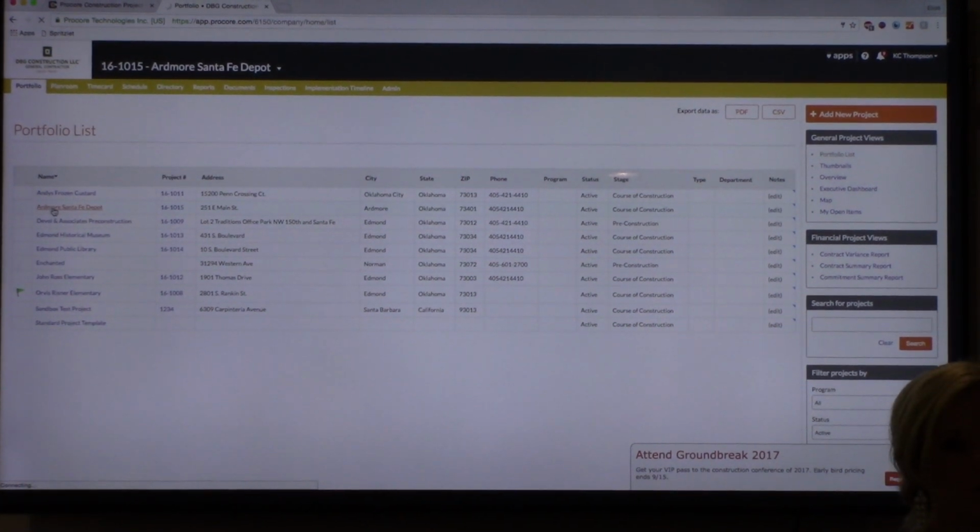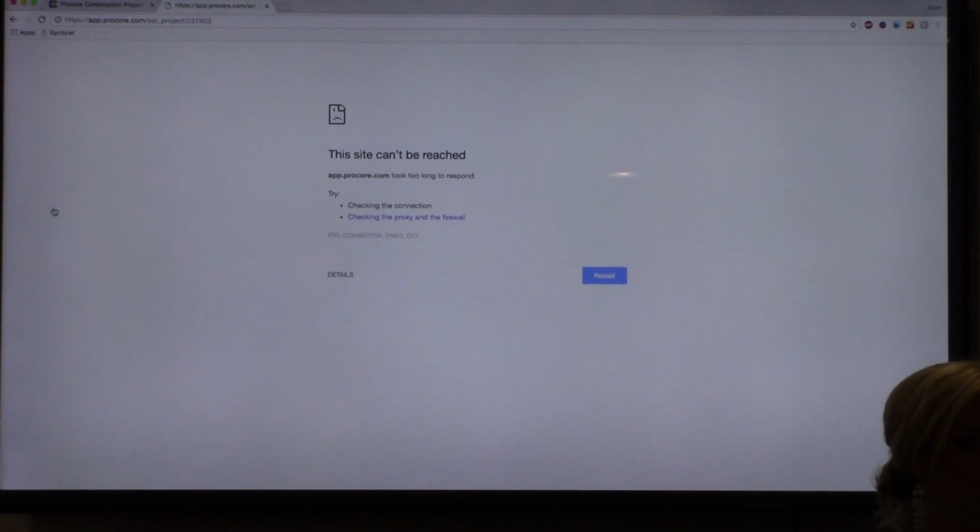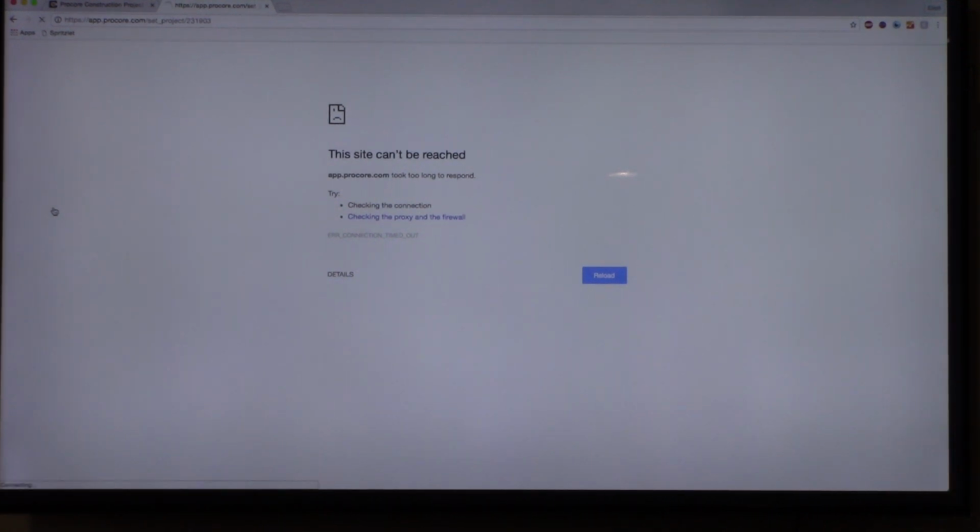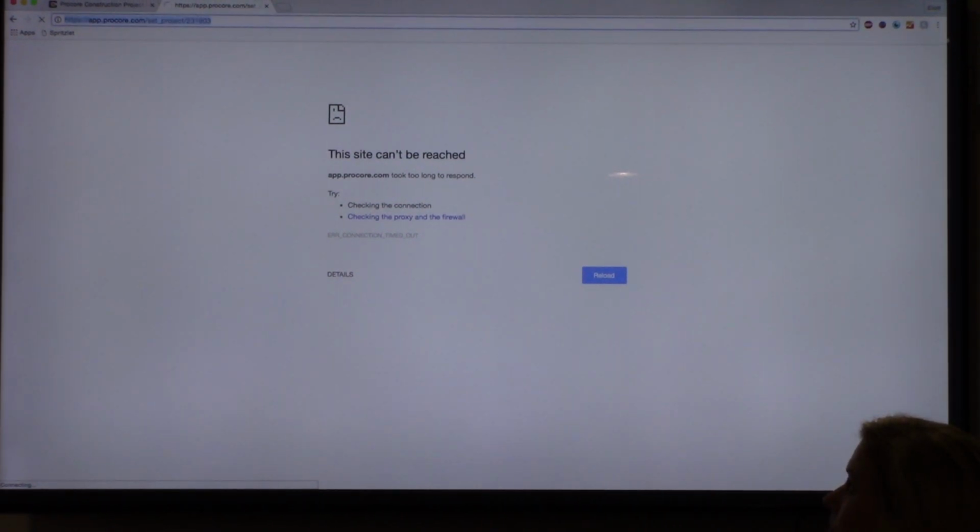So just add a little bit. If you're doing anything with that email, part of the Procore training is to consciously reply to all, because then that CC of the Procore email will always be linked to any email that goes on with that whole chain. So that way we can track it and make sure we're kept in the loop with everybody's replies, responses, all of that.